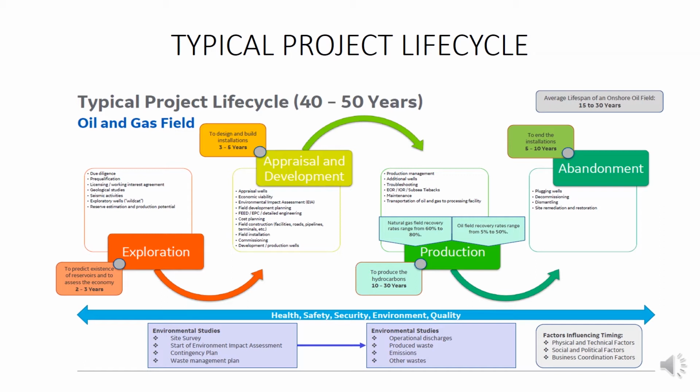Moving on to the appraisal and development phase, it takes 3 to 5 years to design and build installations. This phase consists of appraisal wells, economic viability, environmental impact assessment, field development planning, cost planning, field construction, field installation, commissioning, development, and production wells.